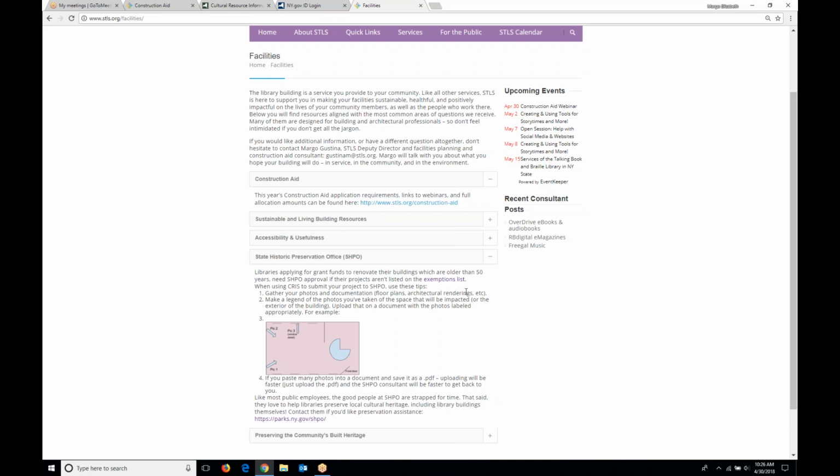Every time they have to ask you a question and you have to submit your answer through the CRIS system, that restarts the 30-day window they have to respond to your request. So it really eats a lot of time. And you are required to have that State Historic Preservation Office approval when you apply to STLS the beginning of July. Remember, there is an exemptions list.